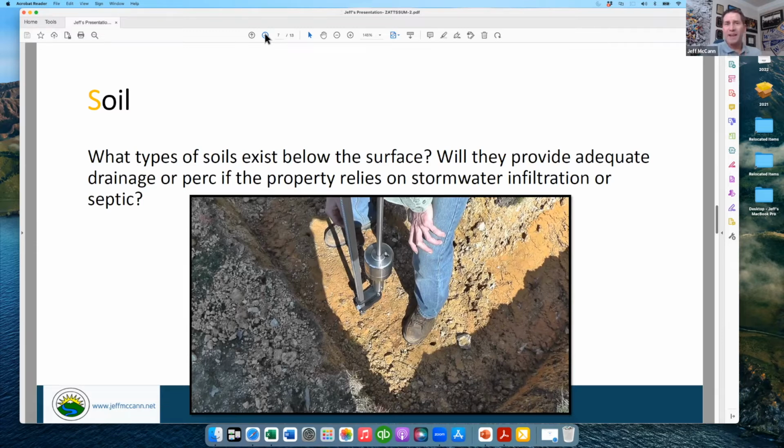And we have a lot of glacial till around this area, which is really good to build in the summer, because you could set it up and it's going to be a great building material, but just a little too much water takes it out of its optimum moisture content range, and it pretty quickly becomes a soupy, muddy mess. And so, if you have that soil type, we would know that we may not want to be dealing with this property during the winter.